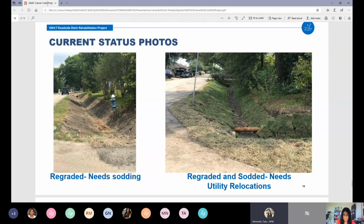So there are a lot of old neighborhoods where we see a homeowner has covered the entire property and they claim that it existed like that 40 years ago. Unfortunately, we cannot pave the entire area for all these neighbors who have had these driveways for a long time, because we'll end up covering up most of our system, which is counterproductive to our drainage needs because, like we said, the more open system has more capacity for storage. And every bit of this we close up, it's going to cause issues. So we do what we can best do. If we have records, if we have documents, we put it back. If we can't find these records, we cannot make assumptions one way or the other.